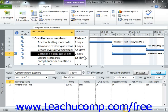At this point in your project development, you should have an initial project plan created. Before you begin to record the actual progress made or the actual work performed on the tasks within your project file, you should save a copy of the original project plan. This copy is called a project baseline. You can use the baseline as a reference point later on as you begin to track the actual work performed on the project.